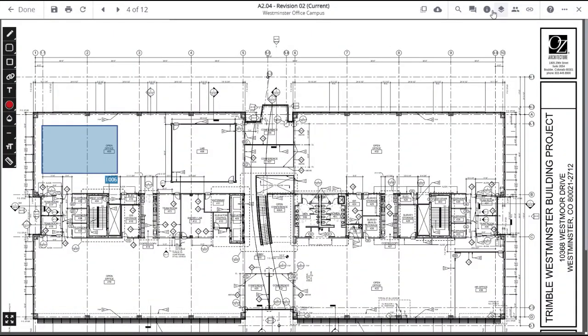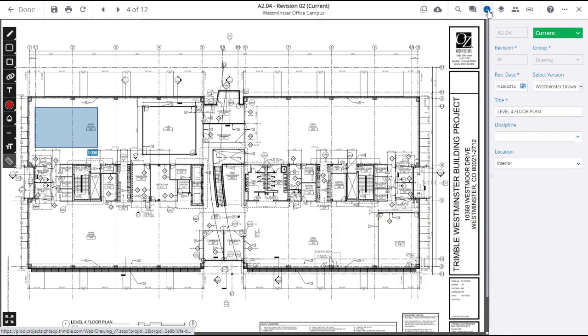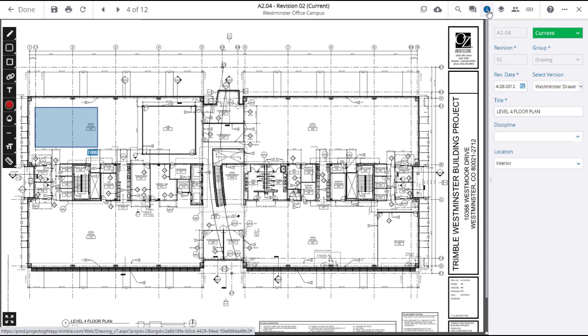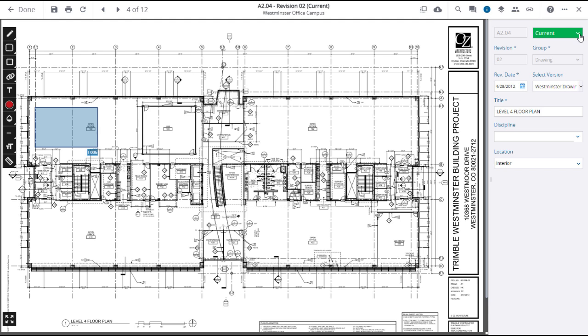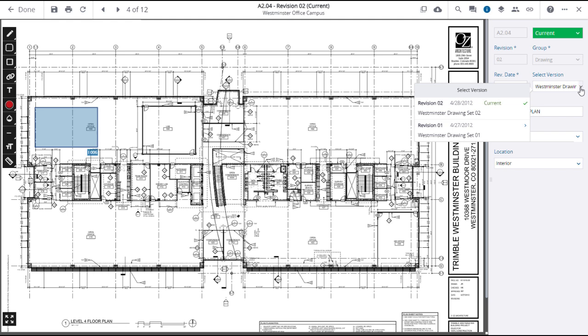When you click on the Drawing Information icon, the right panel will reveal basic information regarding the selected drawing. This includes whether the drawing is current or obsolete, the revision date, and the selected version which allows you to toggle between different revisions of the drawing.